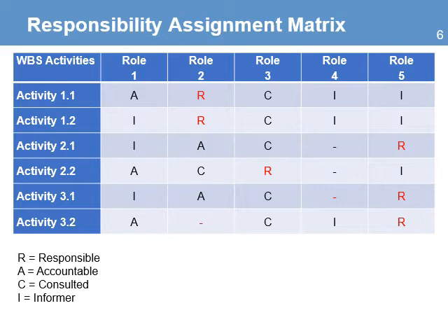For each one of the WBS activities in the project, you need to identify the roles in your team for each activity. The most important role is responsibility. Each activity must have one person responsible for managing and completing the activity, either responsible for doing the work or responsible for supervising the work of a third-party individual or people, like consultants or vendors. The basic rule is to only assign one person as responsible, not 2 or 3.